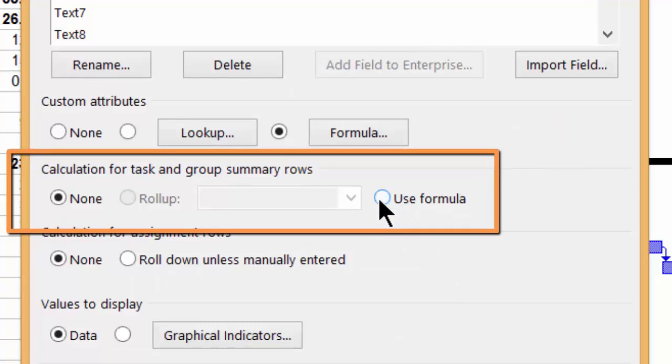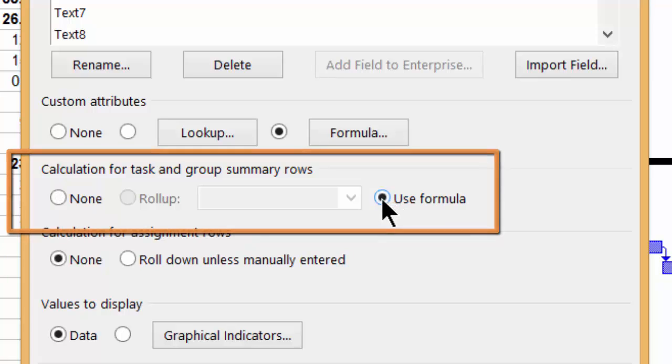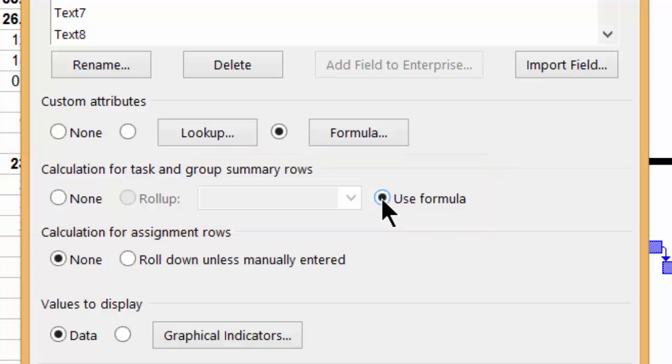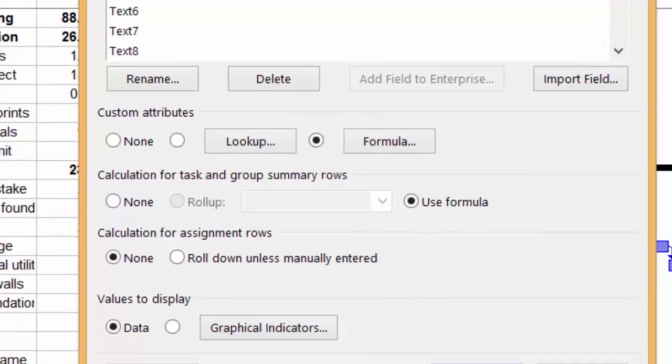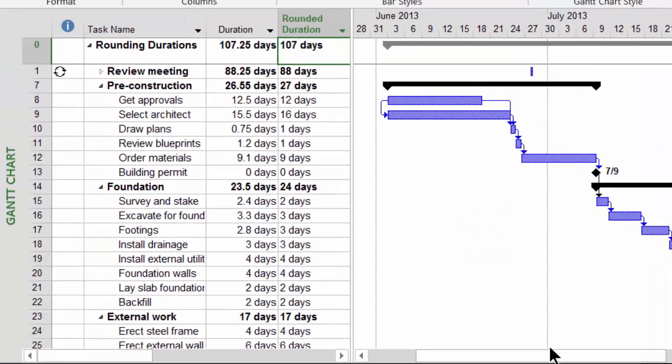This needs to be told to use the same formula that was used as the custom attribute for the individual tasks. That will then carry over the rounding logic to the summaries.